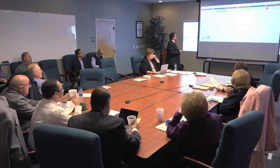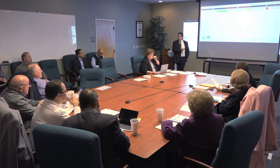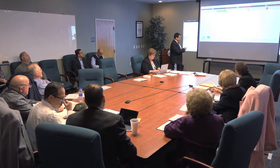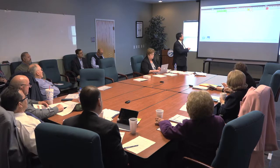Keeping in mind, I'm giving you our best guess of when we're going to open as far as the semester. You could ask, why don't you open in January? But I know there's at least a 30-day extension coming up. That includes those days. If you recall, in September we didn't actually start until October on the Mission El Paso project. So that puts us right in the middle of January. From where we are to when we're supposed to be done, the likelihood that we'll have more extensions is high. All it takes is a good rain in August, and we're past the beginning of the spring semester.